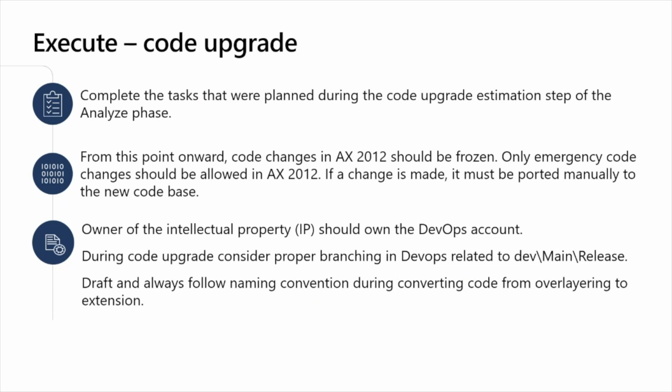From this point onward, code changes in AX2012 should be frozen. Only emergency code changes should be allowed in AX2012. If a change is made, it must be ported manually to the new code base.